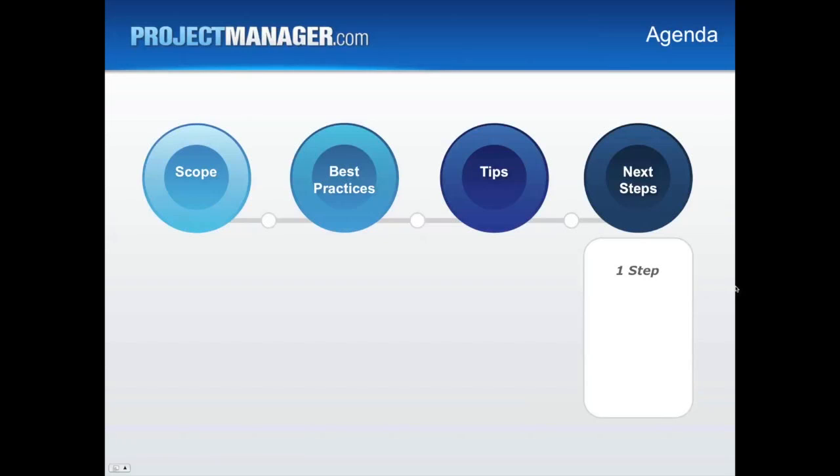I've been shocked and amazed constantly on projects at what decisions have been made by the change control board. Because remember, the board are the people who have the authority. They've been named by the organization, they've been named by the project, they're in the project plan, and they have the authority for their organization to evaluate the change request and either approve or deny it. Sometimes they may have you include it, but you as the project manager have to work with the team to bring back information on a change request and what impacts it may have, because that's where your strong suit is. That's where your influence and impact comes in as a project manager, working with the team to bring back powerful information. You don't tell them they can or can't. You say, if we do this change, here are the impacts.